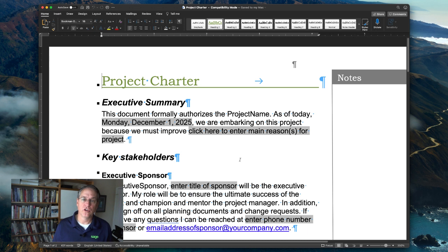We're just going to take a look and go through some of the details on this. The first thing that you'll see is the executive summary, right? It's one sentence here at the end, talks about that we're formally authorizing this, and that here's the reason for us doing this. All of these inputs, this main reason, actually comes from the feasibility analysis. So that's what I'm saying. Those are really input documents to this. You could, in a certain sense, start with the project charter if you've answered the first two questions that I alluded to earlier in the affirmative. Can we do this? Yes, we can.